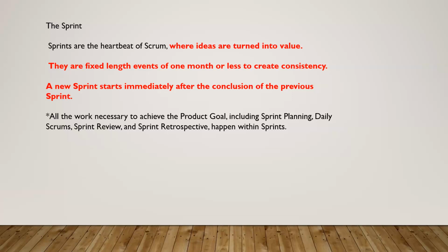If my work is a bigger one, which takes a lot of time, let us say this whole thing takes 10 days on the whole, that is one of the bigger problems I have. Then what you will do is divide that into 10 subtasks and say, in this particular sprint, I will take only 2 to 3 tasks and work on them. In that way, you are making the complex into a simpler one.